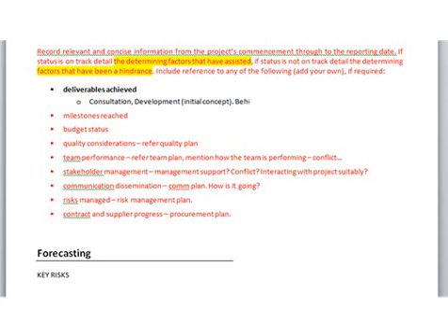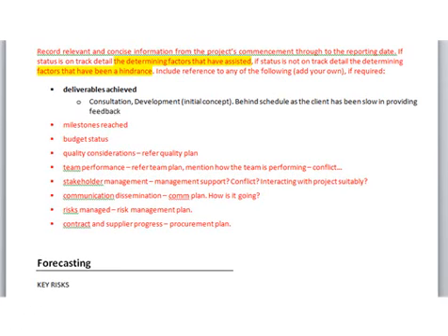This is behind schedule as the client has been slow in providing feedback on initial concepts. So there we have a reason as to why it's going slow, and if I were going to plan a similar project in the future, I might want to flag that this can happen and find or create some processes to help clients be able to give me feedback quicker.